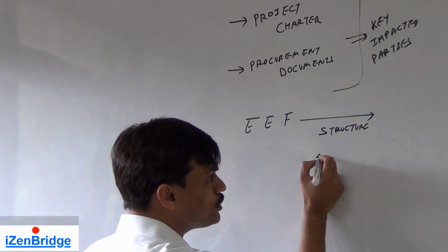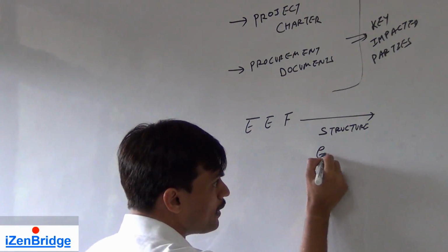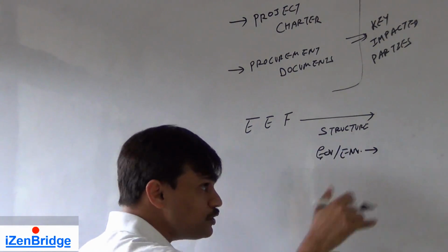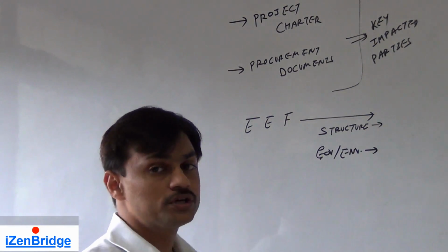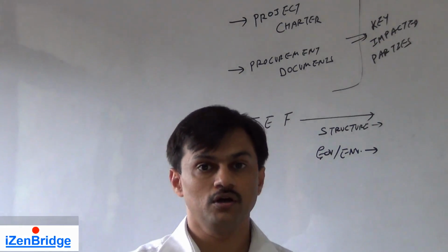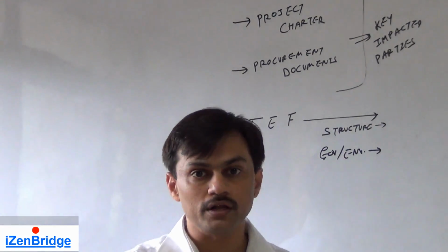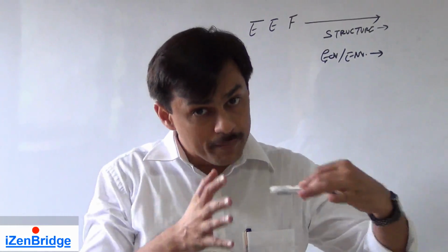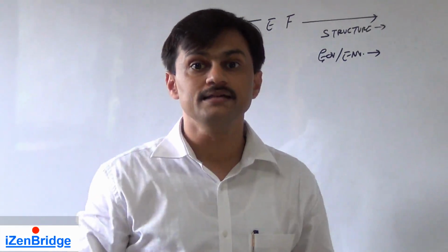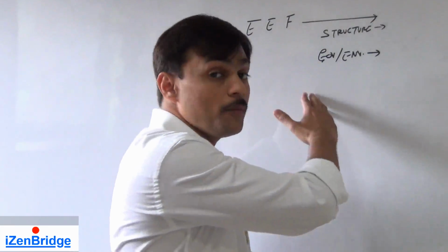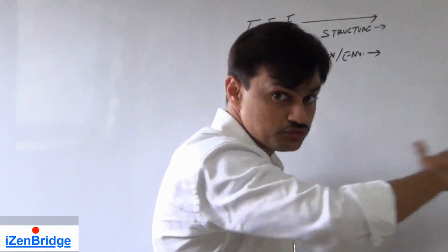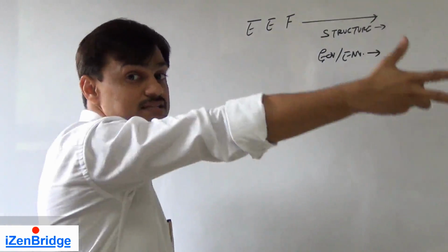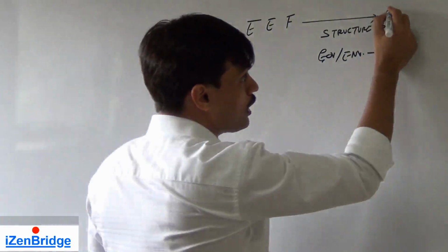We also need to look into government or environmental agencies. The environment you are working in may also put some kind of stakeholders on you. If you are working in a construction project, you know that the community, the environmental groups and the government are stakeholders, in order to get approval for the next work. So the environment you are working in, internal as well as external, will give you a people list.